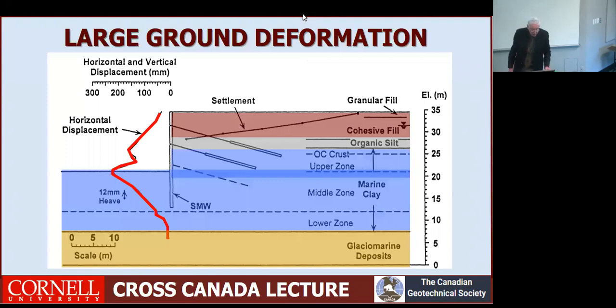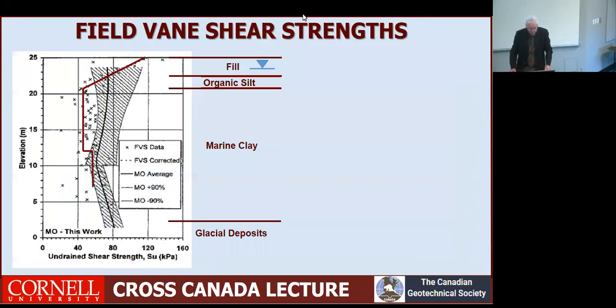You can see that the displacements here have gone over 200 millimeters, between 200 and 300 millimeters. It was getting to be quite significant. And they backfilled the excavation up to a higher elevation and stabilized everything. And then the question was, why? Well, the reason why had to do with this excavation unloading.